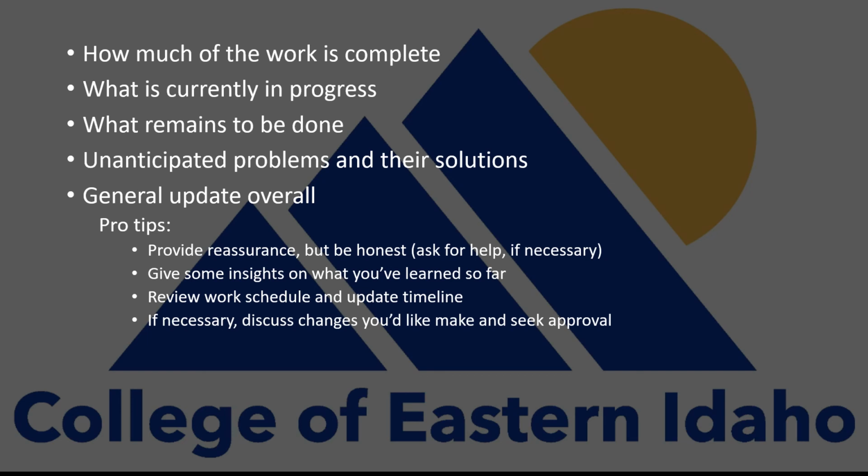All of that is part of talking about how the project might have changed or might need to change as you prepare this report. Then, if you think that changes are required, you can't assume that that's okay. You need to then, you're essentially going back and updating your initial proposal and getting reapproval for the pieces of it that are going to be different than what you initially proposed.